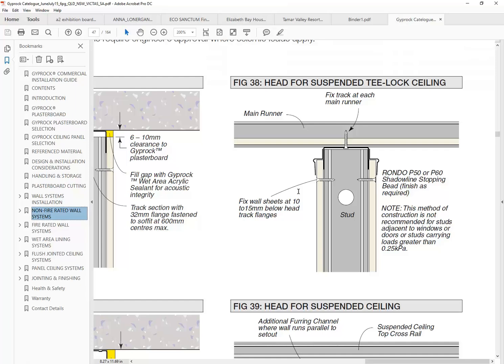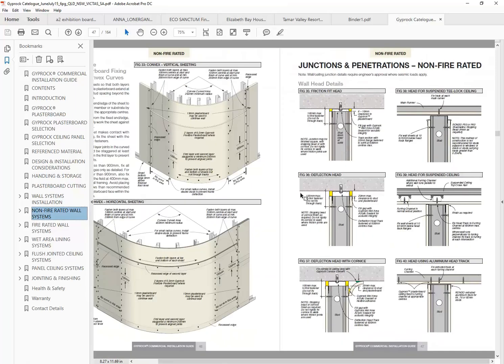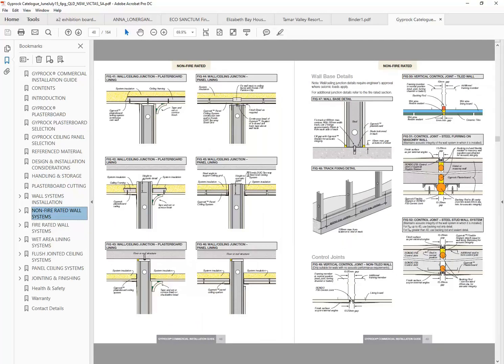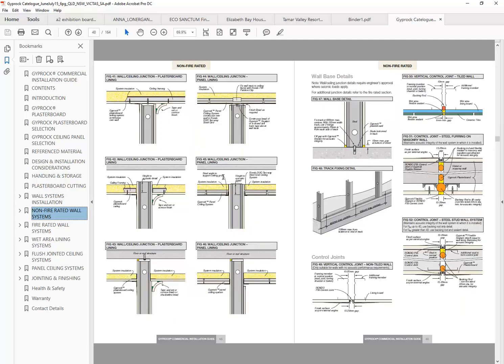In fact, if I was building this myself, I would be looking at having a different system. I would be having the one that was on the next page here, where you would have the wall built first, and then you would come back and build the ceilings inside the walls. That's actually the more typical approach for a space like this. But there's no right or wrong there. There are reasons for doing it in either way, but for this space, I think either method probably would be okay, but you know, there are reasons I would do it like this.